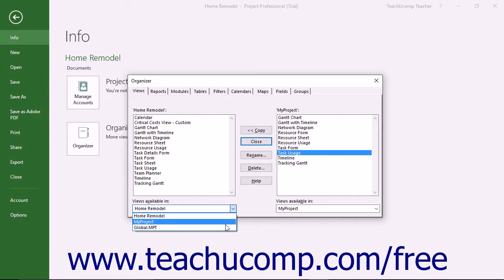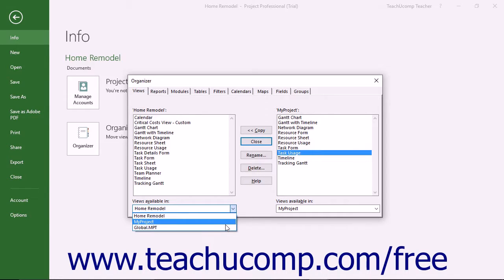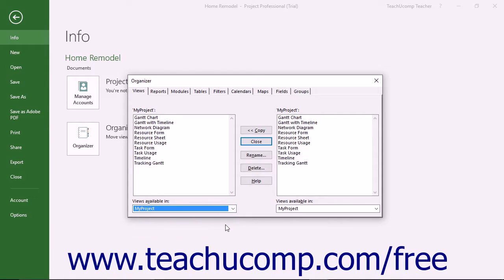If using Project Server, you may not be able to copy elements into the Global Plus Non-Cached Enterprise template due to network security settings. However, if using a standalone copy of Microsoft Project, you can copy elements into the Global MPT file.